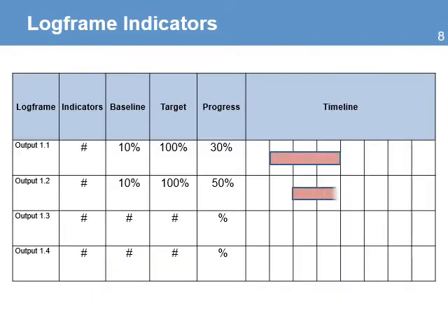The indicators from the logical framework are used in the monitoring plan to determine the progress the project makes in achieving its targets. The monitoring plan includes information on the targets, the milestones the project expects to achieve, and the progress it makes. Deviations from the plan are warning signs that something is wrong and you need to take action.